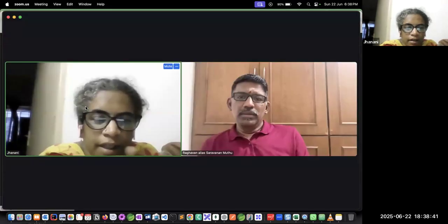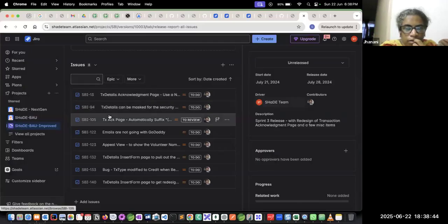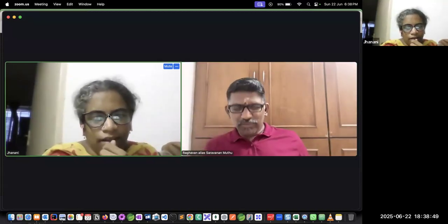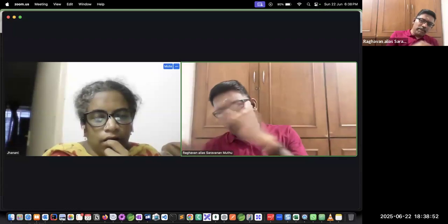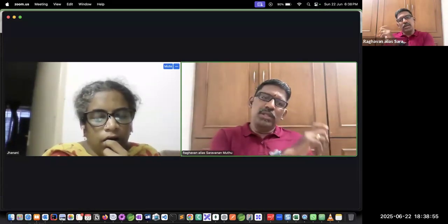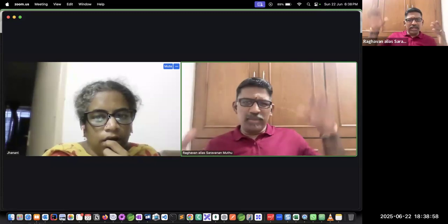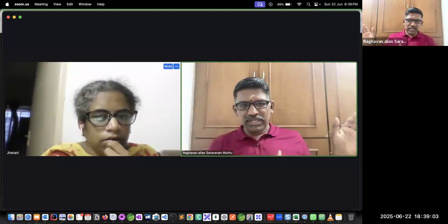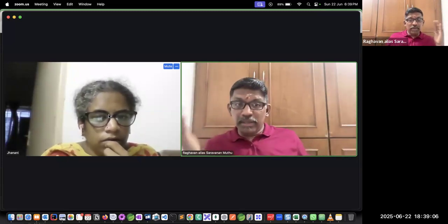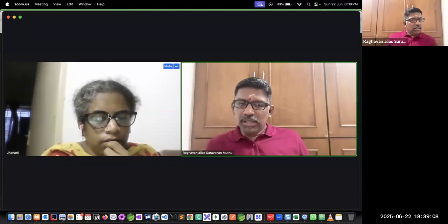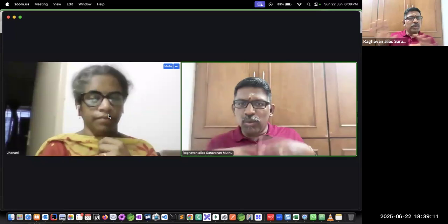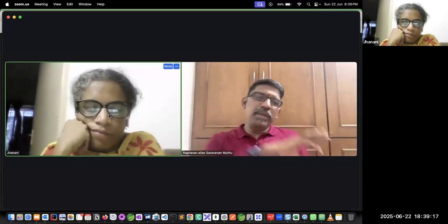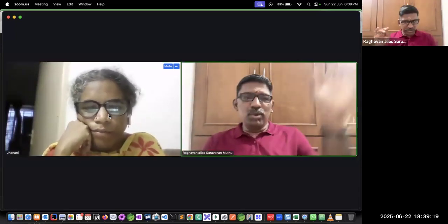And how to move the SBI 13 to BAU? That is what we need to do. Directly we can't do it. We need to copy paste. Jira generally doesn't allow it. We can mark it invalid, take it out, close it, clone this or whatever. We have to see whether they allow it or not. It's up to Atlassian to allow the movement of a Jira from one project to another project. The version of Jira that I have been working on didn't support it. We could only manipulate it within the board. What we could do, we can close this, then copy and paste it to the SHaDE next gen board itself.